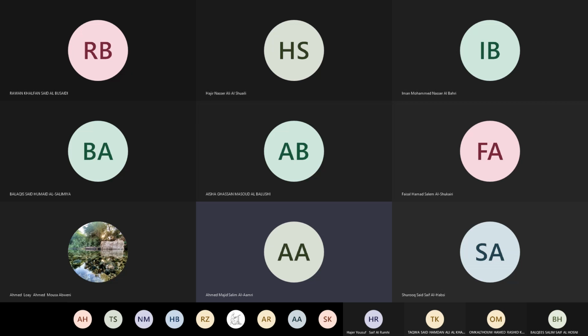And we have learned that there are certain things that we need to look at when we are doing the sequencing, like the technicality, the procedures, whatever we referred to as hard logic and soft logic, if you remember, and then the number of resources that we are having. After that, we will be able to estimate the number of resources. Accordingly, we can estimate the duration of the task, and then finally you will have your time plan.